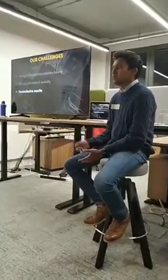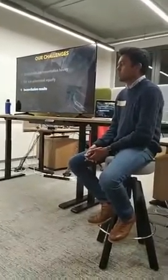UX was often not prioritized equally in the sprint backlog because the time the designers took was really long, and the tasks were not broken down into user stories that an entire team could buy into and take ownership of, so that UX is a responsibility of the whole team. It was not explicit in the backlog. They had to work somehow by themselves and then bring the handoffs to the team. And there were always inconclusive results. Whatever research methods the designers used, it was always a never-ending process. We didn't stop with one specific decision, and we couldn't convince our customers and the business.